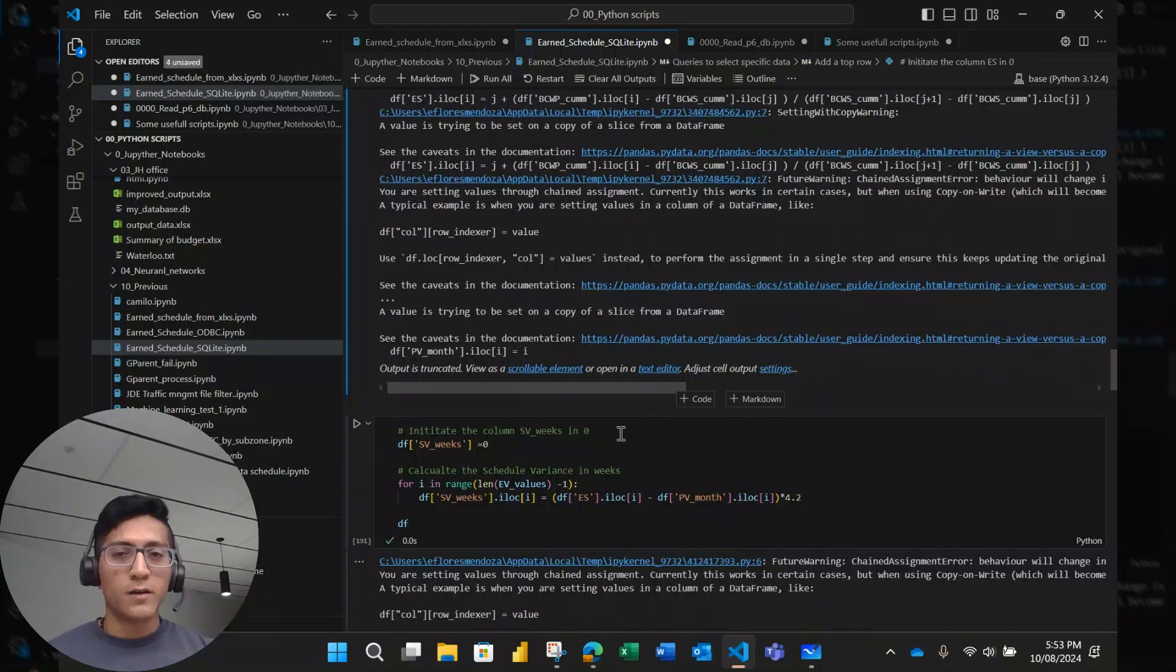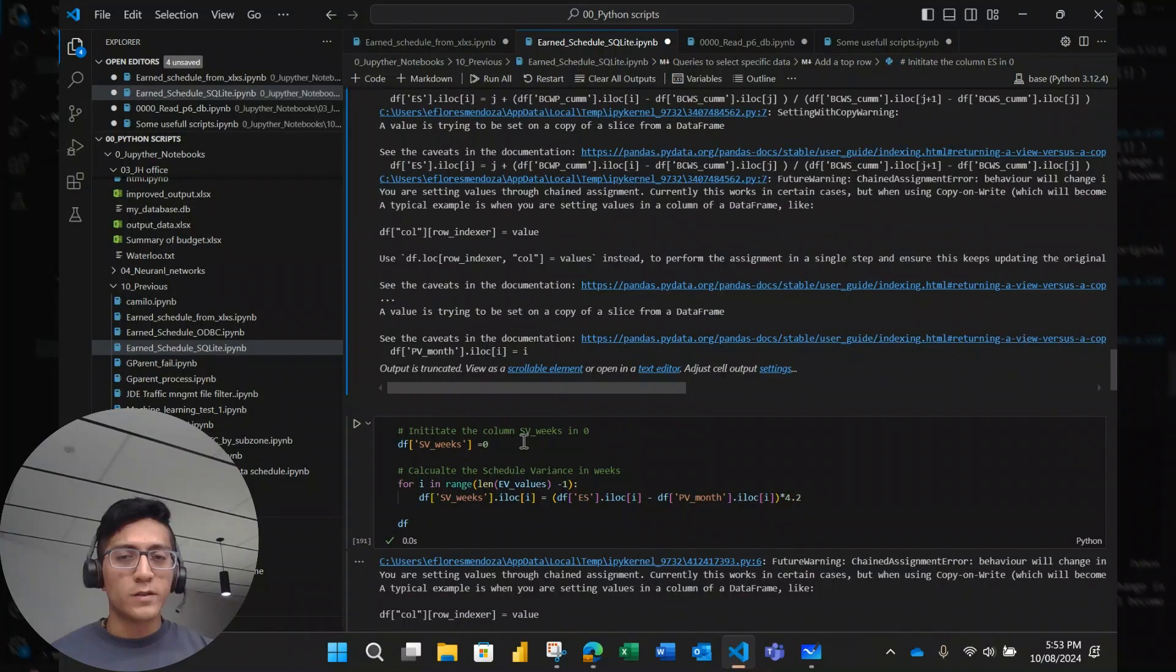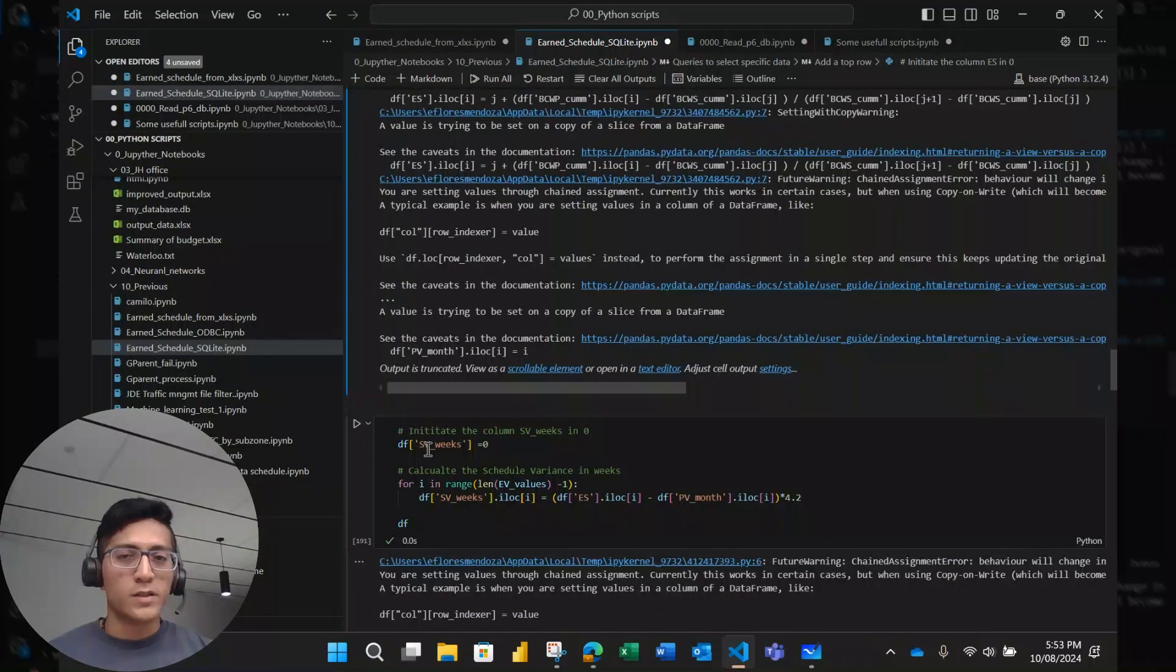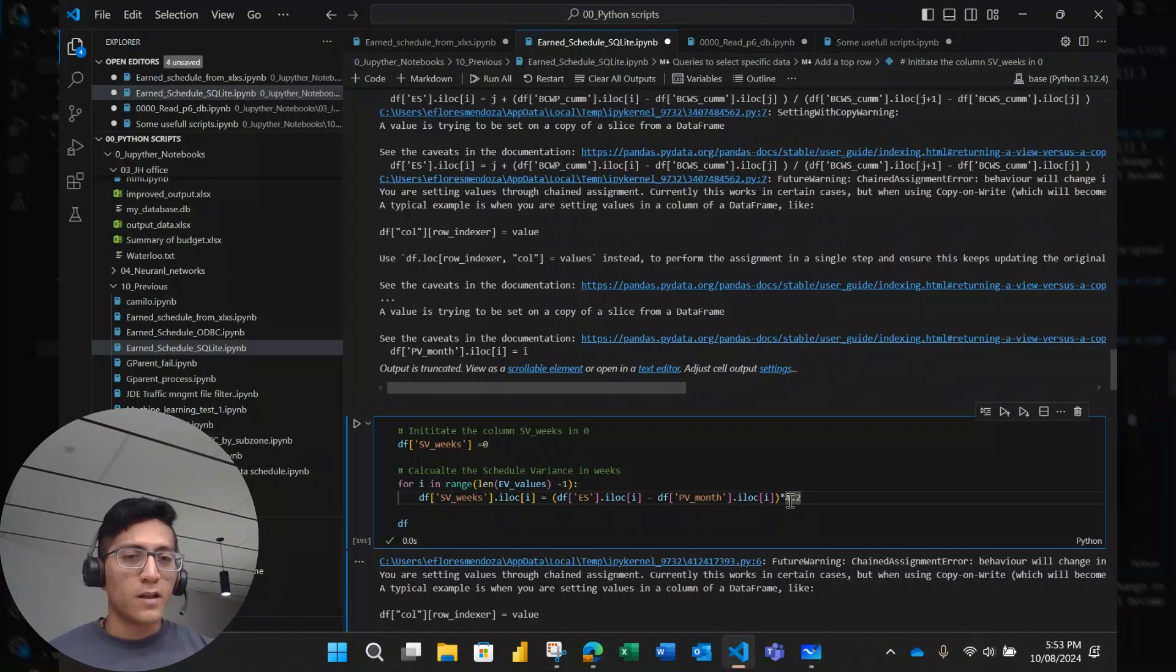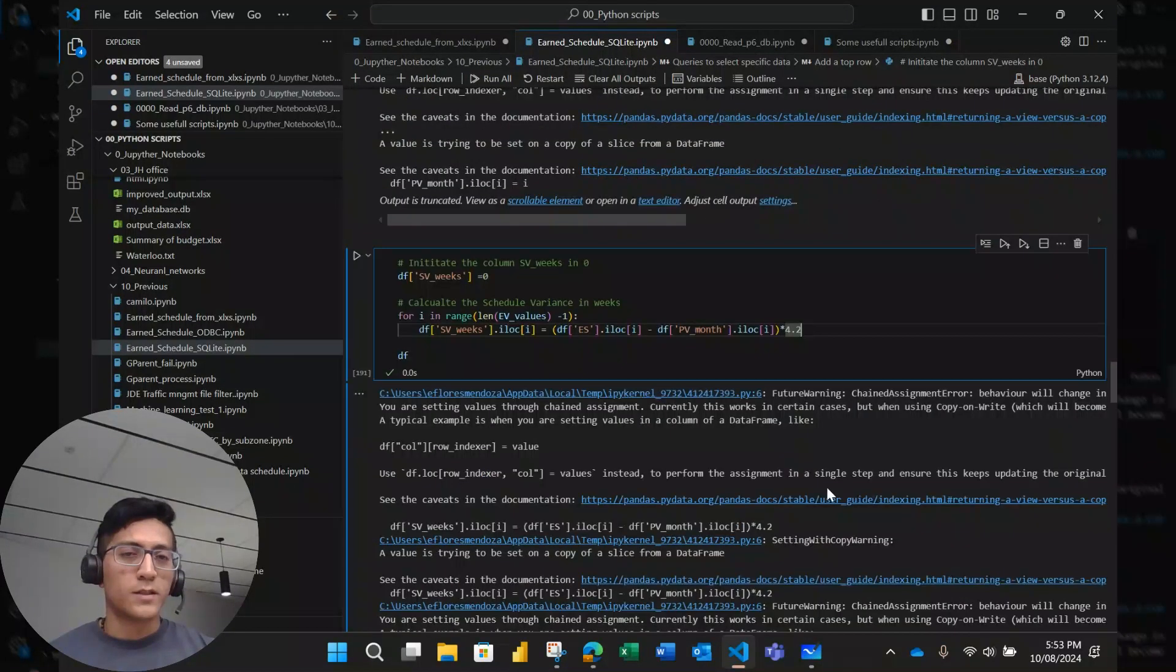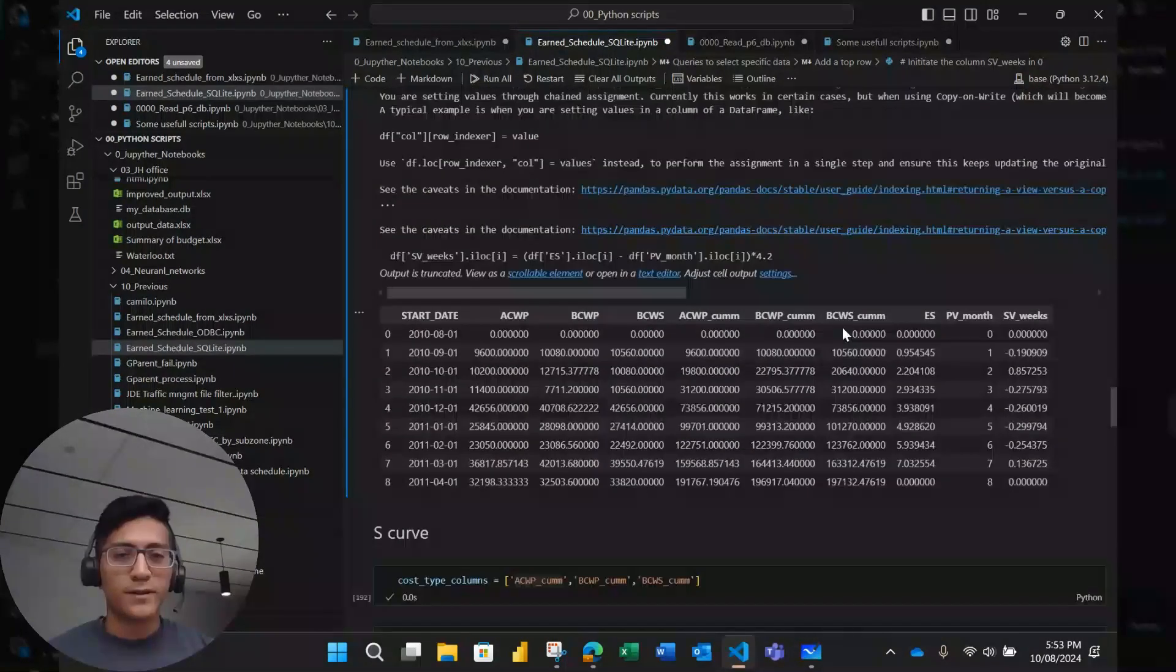And then finally, what I did here is we use this earned schedule to calculate a metric which is earned schedule variance but in weeks. In this case, I consider that a month has 4.2 weeks. And that's it. We got the table.